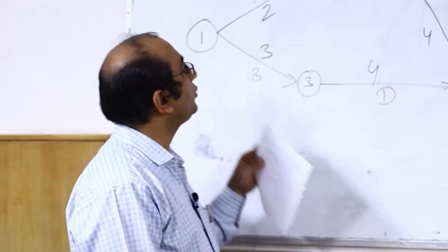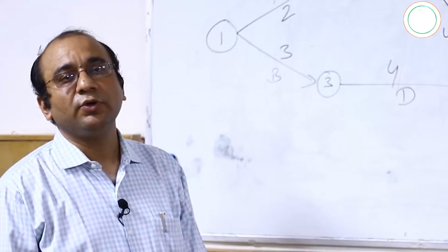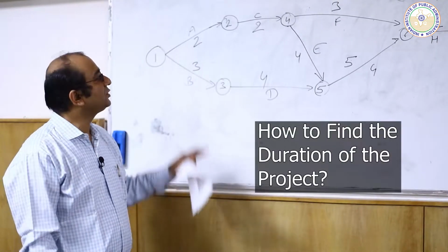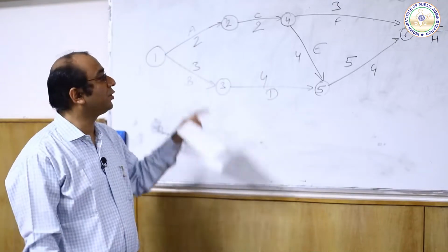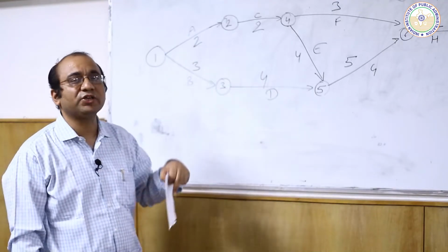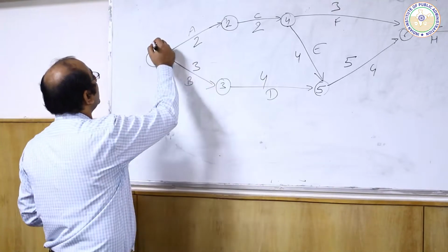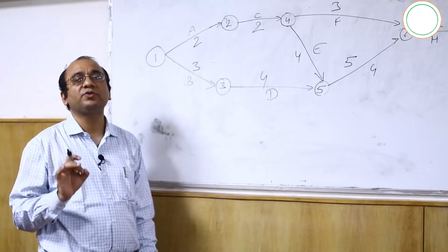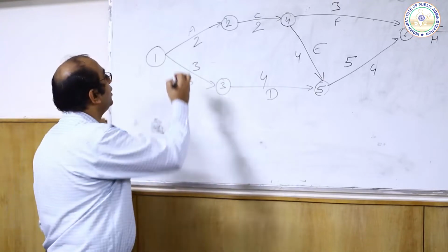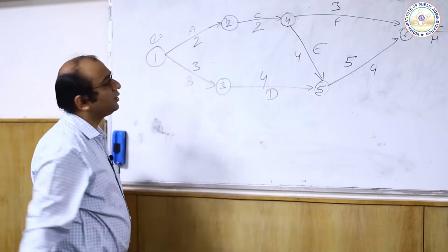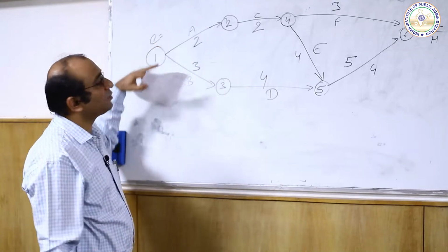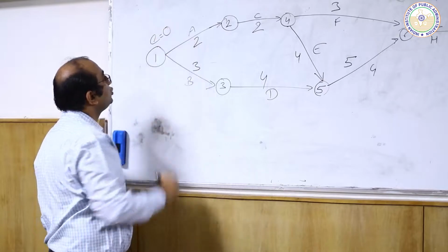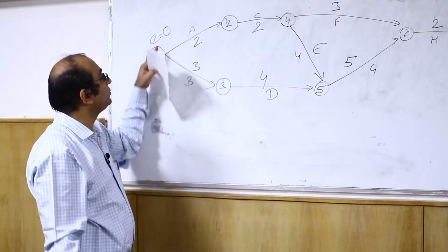How are we going to use these particular timings? We are now going to calculate for determining CPM, because this is a deterministic model that we have assumed, since we know the time and duration of each and every activity. We are going to start with the earliest starting time by which we can start a project activity. E is the earliest start time. The earliest start for this can be at period 0, that is from where I am starting.